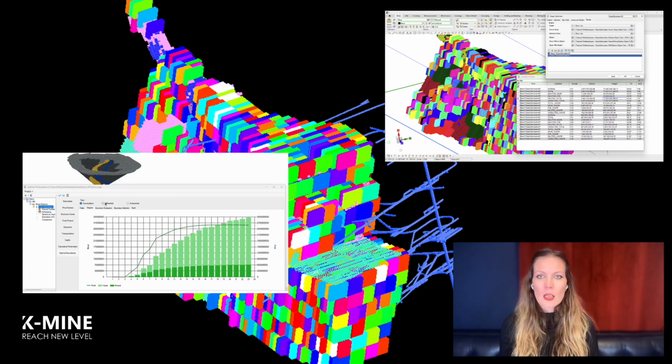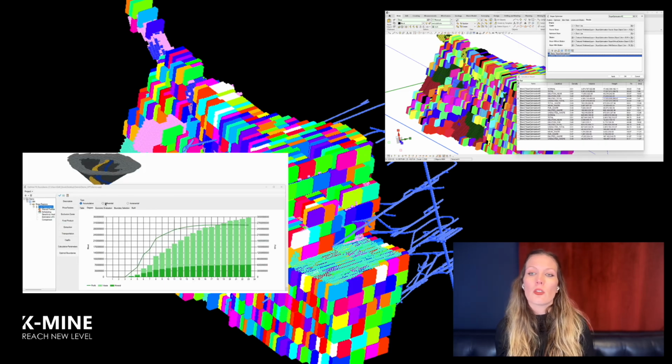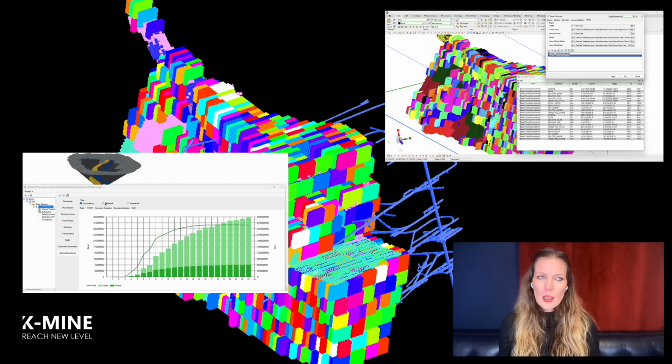In one case study, a sequential approach, which is pit followed by underground, delivered an NPV of $7.51 billion, with an optimal transition depth of around 887 meters, better than going fully open pit to the same depth. Another study found that optimizing the transition point boosted NPV by 2.06% compared to a non-optimized plan. That may not sound like much, but in a large mine, 2% can mean hundreds of millions of dollars.